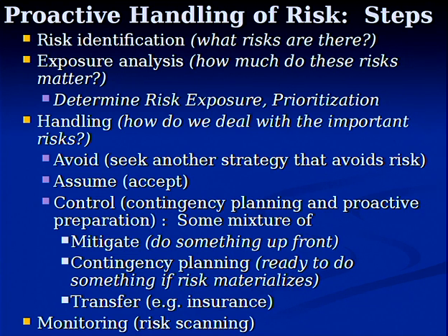So, talk about sickness within your team. Someone getting sick or someone dropping. You could have a shadowing protocol put on where people shadow each other for some of their tasks. Or you could have a lot of pair programming going on, right? Have people work alongside each other, pair debugging, so that you spread knowledge around. These are ways you invest up front to mitigate this risk.